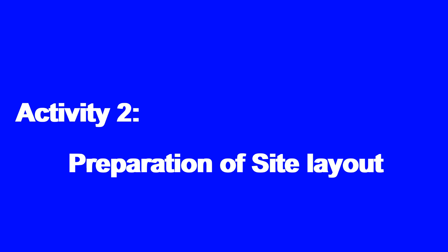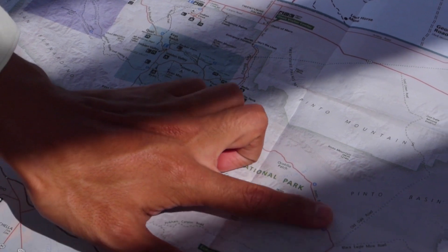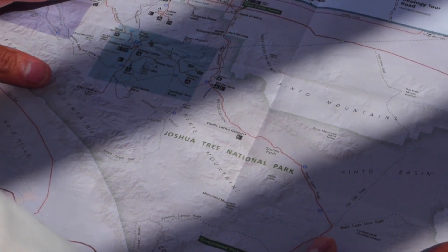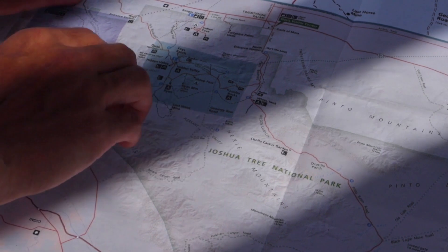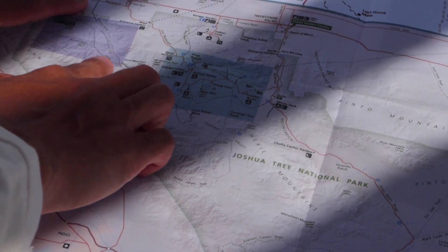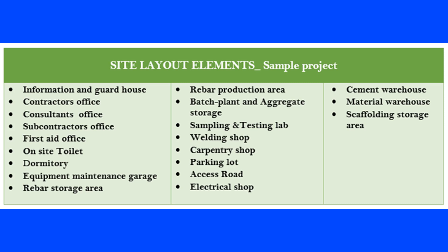Activity number two: preparation of site layout. Once you define the site boundaries, you can prepare a site layout or site organization plan. The layout of a construction site includes locating, sizing, and positioning of temporary facilities — from small facilities to warehouses, fabrication shops, repair shops, storage areas, batching plants, and so on.